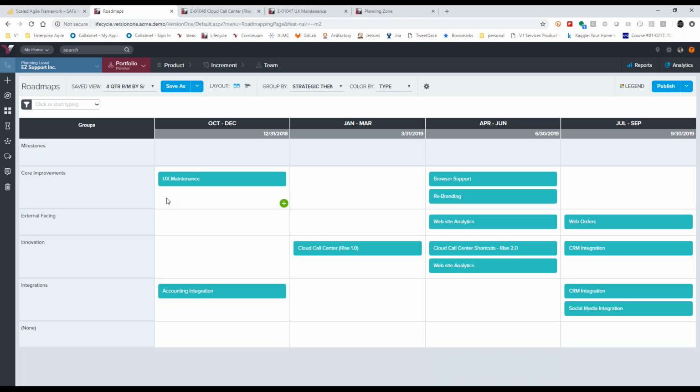Right, so if we're focused primarily on portfolios, then all the portfolio items here are going to be described as epics. Those epics will have a number of Agile release trains that are going to execute against them. They're going to elaborate against these epics to create things like enablers, capabilities, features. Ultimately, they're going to describe user stories that are going to roll up and help to provide the feedback that is the other part of the Lean Agile portfolio tenets.